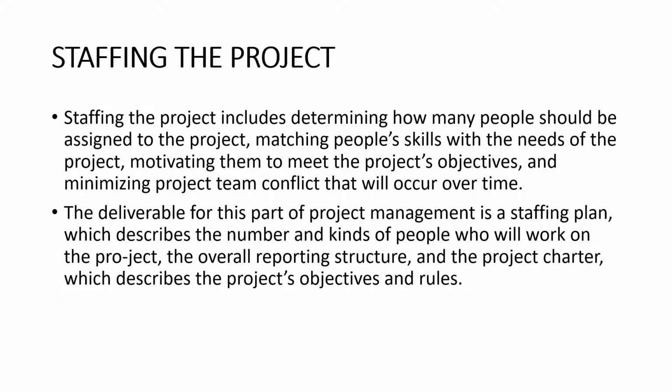So the deliverable for this part of project management is a staffing plan, which describes the number and kinds of people who will work on the project and the overall reporting structure, and the project charter, which describes the project objective and rules. So with a team of 4, you're going to assign who's the programmer, who's the project manager, who will handle the documentation, and kung sino yung taga-timpla ng kape.